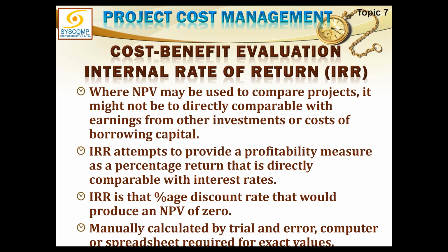Wonderful, wonderful. We do understand that when NPV becomes equal to 0, we are at the break-even point. So anything more than 0 would be my benefit. So I will try to make the NPV 0. I'll apply various percentages, 1%, 2%, 3%, 4%, 5%, and I'll calculate the NPV with every percentage. My values will sometimes become negative, sometimes positive. So I will try to home in on 0. Maybe I get my 0 at